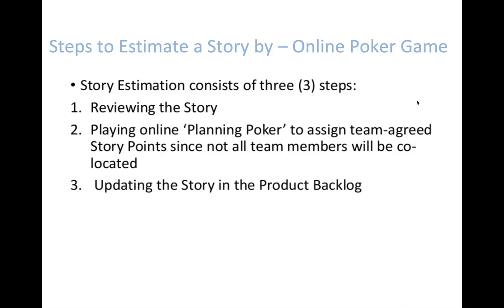Sometimes some people are experienced and some people have very low experience, so they are not able to understand the aspects of that user story, like what we need to cover to develop this feature. After discussion, working in collaboration mode, they will come up with a single story point value, and that is the final estimation for the user story.